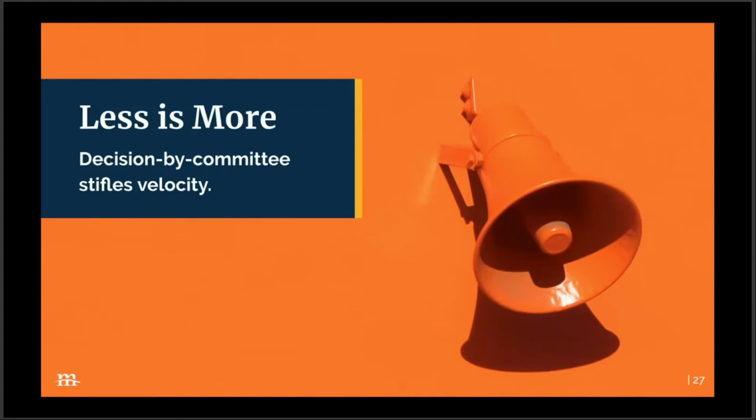You can't skip meetings when you're working Agile. And the more stakeholders you try to bring into those meetings, the harder that's going to be to do. So make sure you're building a rather small, engaged project team. And then for the larger group, for everyone that needs to be involved, that is something you can do more on a quarterly basis to keep everyone informed.